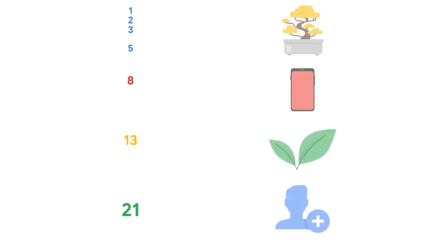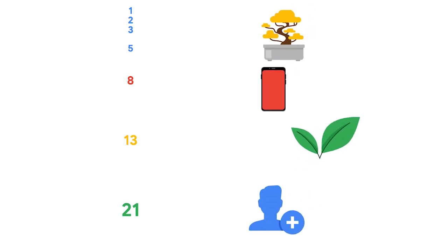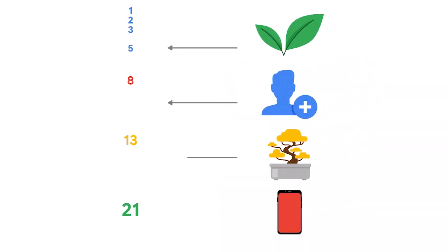Now, we can see that adding a new user and adding bonsai trees to our catalog aren't quite the same size, which the t-shirt sizes might have implied. Using story points, a new user is 8 points and the bonsai trees are 13. Why would I mark them this way? Well, implementing a new user page is a simple software update. Adding bonsai trees is more than just software. It includes finding vendors, building a supply chain, and more.